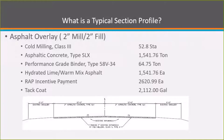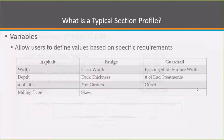Here's an example of a cross-section of roadway work — this is an asphalt overlay, two-inch mill, two-inch fill. As you can see from the cross-section, we're going to mill two inches by cold milling class three, and then fill back two inches of asphalted concrete type LL SLX. The roadway width is 24 feet wide. Based on this information, the standard items or detail items that we would need would be listed here. For every mile, since this particular typical section profile is based on a per-mile unit of measure, these are the quantities for each of the items.